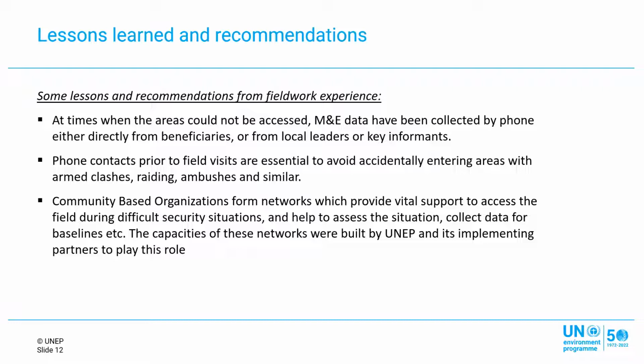So we worked with the local radio stations and managed to have quite good turnover of people who follow and reported back that it was a very successful approach for training. And meanwhile, when you have your key informants and local leaders already set, collection of information by phone was quite a widely used method that we had to apply. And also these phone contacts prior to field visits helped us to have real security checks, not to find ourselves in the middle of an armed clash or in a raiding, wrong time, wrong place.